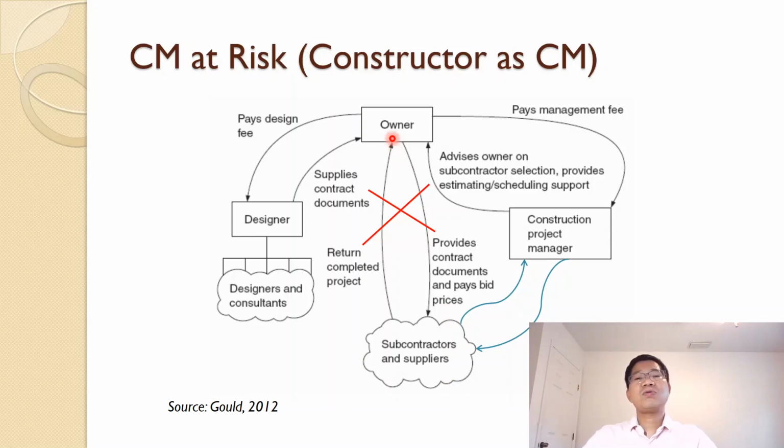So you see, the owner relieves the risk when they perceive the risk, because you advise. Now you have expertise in construction, you need to sign the contract and manage them. So whatever happens, you will talk to the CM at risk, who has to talk to the subcontractor and supplier about the project cost, etc. And if it overruns or underruns, they have to solve that internally. So that is CM at risk. They have to take care of the risk.